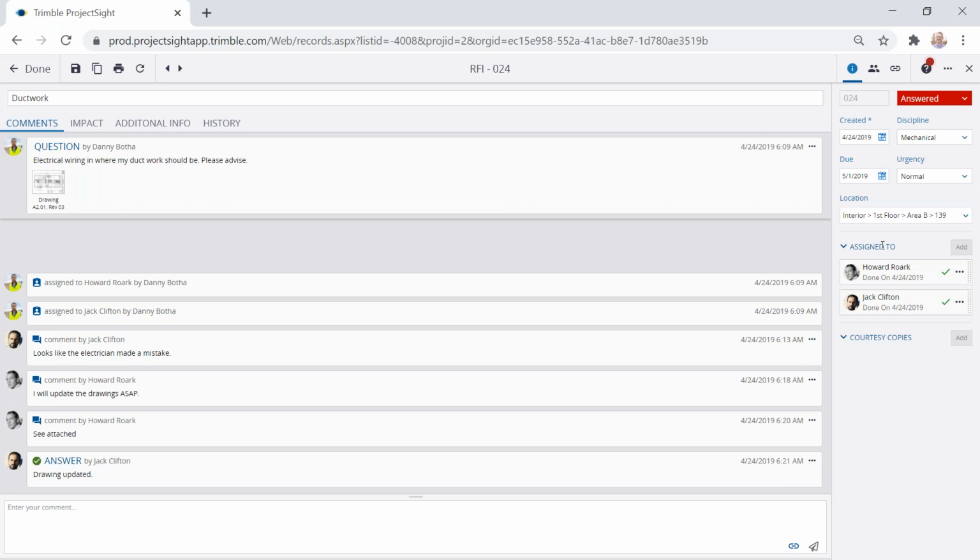We can also assign this to an individual. So I have this assigned to Howard as well as Jack. I can do that individually or in a kind of distribution list. Once this is assigned to Howard, Howard would get an email letting him know there was an RFI assigned to him. It will tell him the question as well as any most recent comment. Howard can respond to that email through his email tool, and we can capture that in our comments tab. Or Howard can click on a link and be driven right into ProjectSight to that specific record.